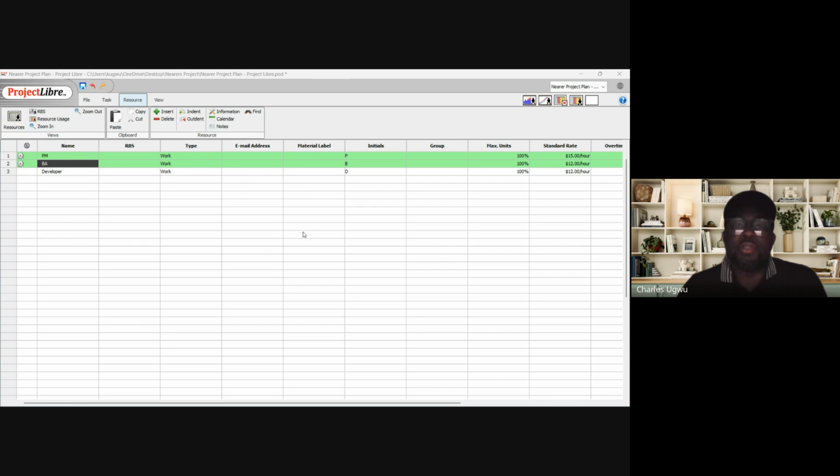So all you need to do, so that you won't be calling BA, saying I've not seen your deliverable, submit your deliverable, when the young man is on holiday, you plan this to avoid this embarrassment. All you need to do is ask the question: when is your availability? After creating a project plan and assigning resources, that is what you should be asking all the team members that you captured in that project. You call everybody one after the other to discuss their availability for this project.